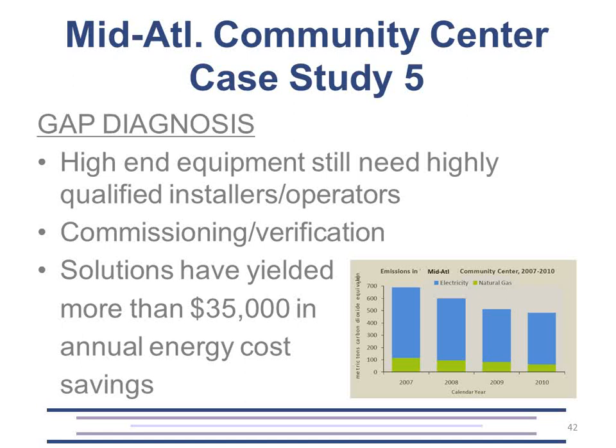Highly qualified designers may have provided that detail, but then again, if the installers and future operators had no accountability to install it correctly and operate it as designed, then that may have been the issue, but we don't know for sure in this case. Whether it be an owner's rep or qualified commissioning agent, someone should have caught these mistakes during the installation, not 3 years later.